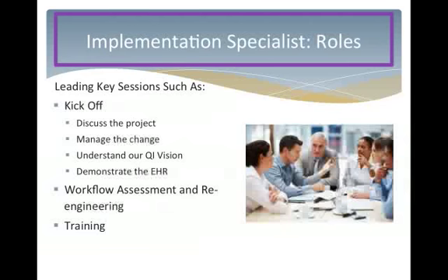We work out a plan where clinical staff will first take advantage of computer-based learning modules to learn the basics of how to document patient care using their new certified EHR technology. Next, there will be a classroom-style learning session for team members to practice their new skills and workflows. And finally, we will provide support on the team in scheduled practice sessions before the big go-live. We plan training right before go-live, so users can remember what they just learned.